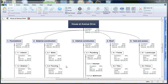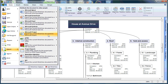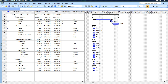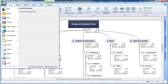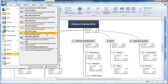To export your Work Breakdown Structure to Microsoft Project, simply choose the MindView icon, select Export, choose Microsoft Project, and MindView converts the file into a fully functional Microsoft Project document with task information, duration, predecessors, resources, and so on. Any changes made in the Microsoft Project file can easily be imported back into MindView by choosing the MindView icon, choosing Import, and selecting Microsoft Project.